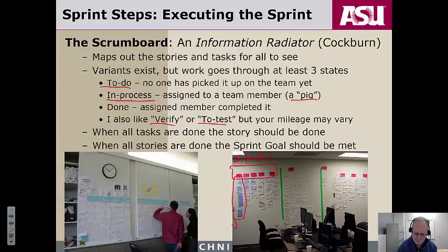What happens is over time, let's say these blue things are normally piled on the left, and they are user stories, or requirements. Again, we'll talk about them. And the white things are tasks. They're items of work to be done, things you actually do. These are verbs, these are nouns. Okay. What happens over time from the beginning of the sprint to the end is, at the beginning of the sprint, you start off with a whole bunch of work you think you need to do on the left. And as you start to do it, you start pushing it over to the right. So the whole flow of the board goes this way, all right, from left to right.